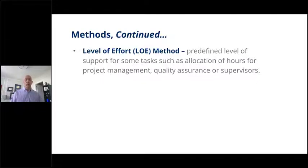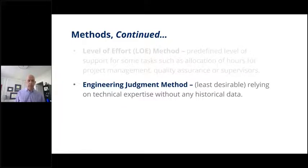and they can give you call volumes. You can take that combined with the previous cost estimating relationship information and align that, okay, for this kind of call volume, we need this many people answering phones. If we have that many people working X number of hours, we need Y number of supervisors. All of that kind of information you put together to build up your basis of estimate.